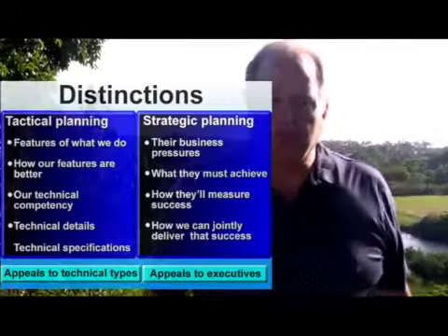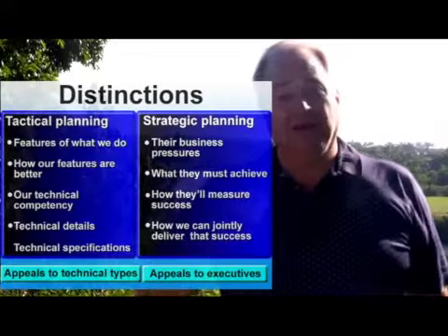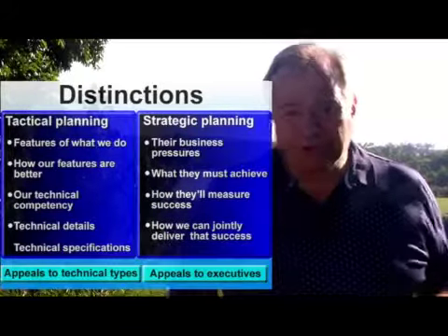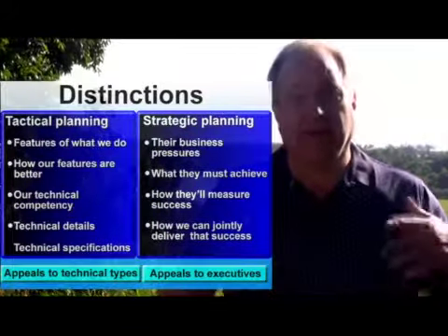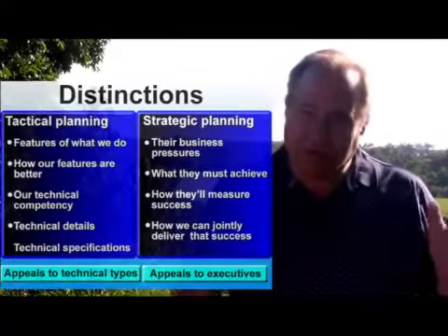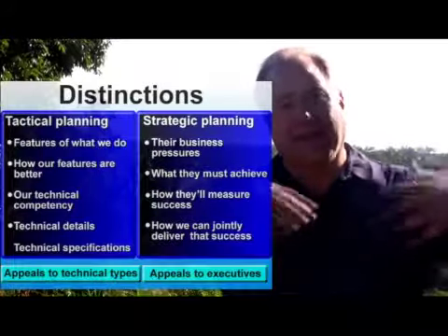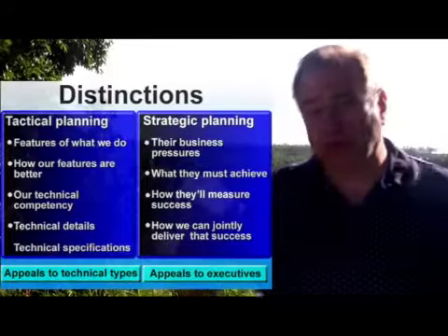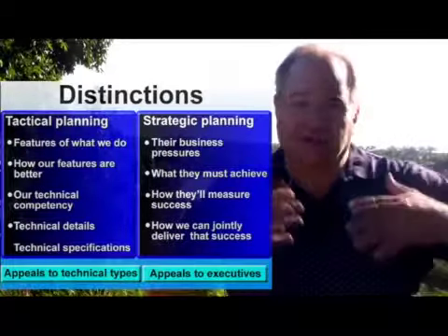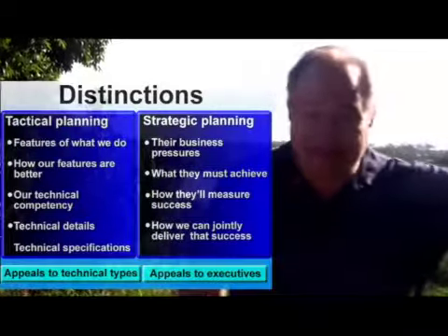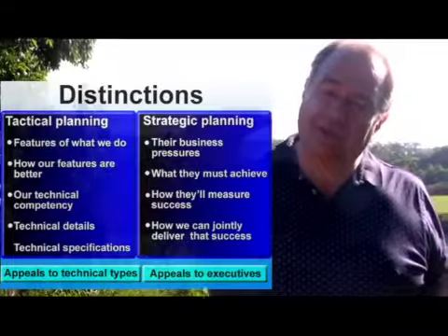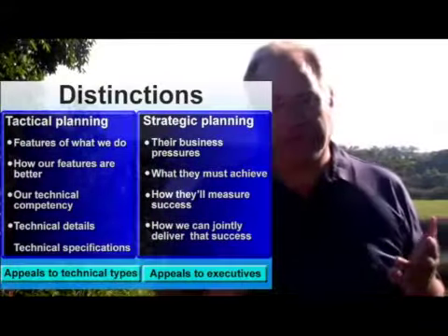Contrast that with strategic planning. You're doing less talking. You want to ask questions that get the executive talking about the long-term achievements he or she wants to see for his or her division, and how he or she will measure those achievements. We're identifying performance pressures. If there's a lot of pressure from the board to increase sales, we want to know that, because we want to craft achievements that relieve that performance pressure.